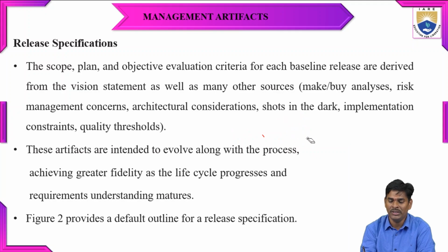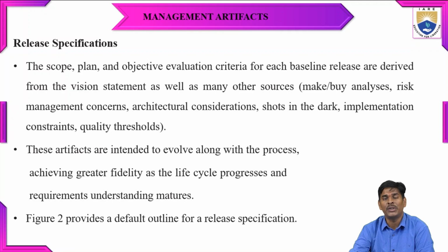Okay, now here the scope, the plan and objective evaluation criteria for each baseline release are derived from the vision statement, as well as many other sources like make or buy analysis, risk management concerns, architecture considerations, shots in the dark, implementation constraints, and quality thresholds.